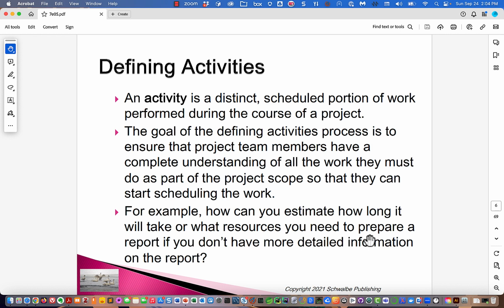And then as we define activities, we will be doing it on the lowest level of the WBS so that these activities or tasks kind of hang off of the lowest of the levels of the WBS. Okay? Now, that's how people get confused and think activities are part of the WBS. Well, in project planning tools, by the time you have a full project plan, you have the activities or tasks hanging off of the bottom of the WBS.